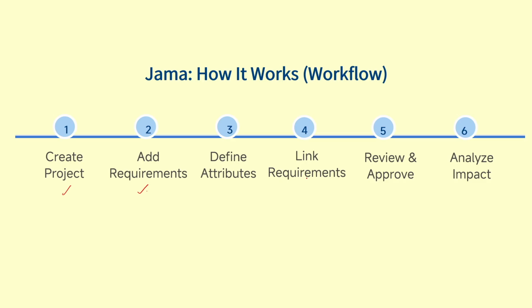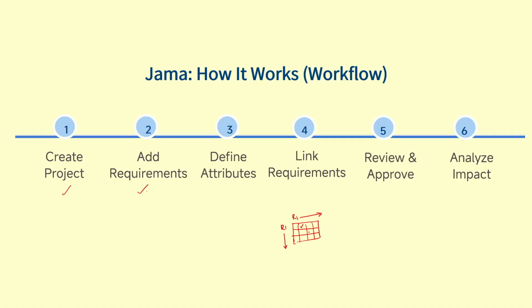This is what I was trying to say earlier. If you remember, we have learned something called a traceability matrix. You will have requirements 1 to n on the top and requirements 1 to n on the left. This is going to be a matrix-like structure. If I have a tick mark, or sometimes there will be a percentage. For simplicity, I will just have a tick mark.